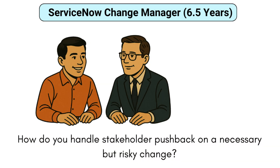How do you handle stakeholder pushback on a necessary change? Yeah, so it happens — this has happened with me as well. In such cases, I first listen to their concerns. Is it about timing? Is it about impact? Or is it about something else? After that, I share detailed information like what testing was done, what rollbacks exist, and what the business benefit of that change is. If after sharing all such information they are still not convinced, I do escalate the matter to the CAB for a decision, put forward the change and its benefits in front of the CAB, and whatever they decide, we follow.